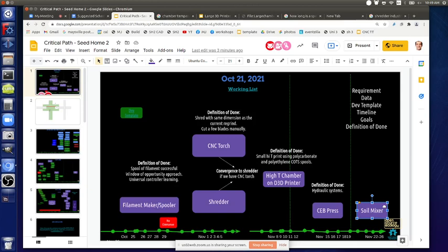And then I'm guessing the first day and a half are really going to be welding mostly, just actually taking the cut metal pieces, putting it all together. And then we have power cube. The hydraulic system has to get implemented, and then I don't know if we plan to do any automation with the universal control or not. But that looks like 4 days, 5 days right there.